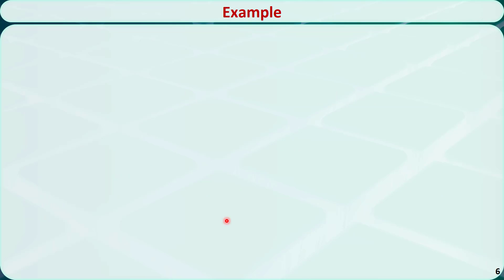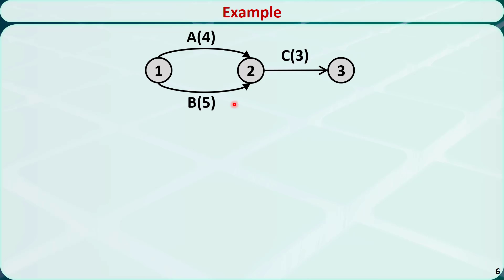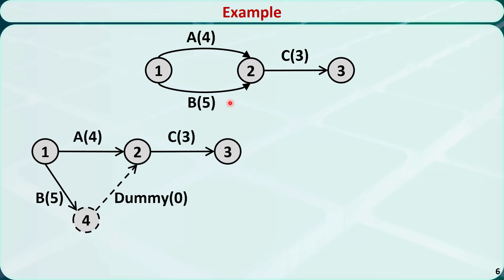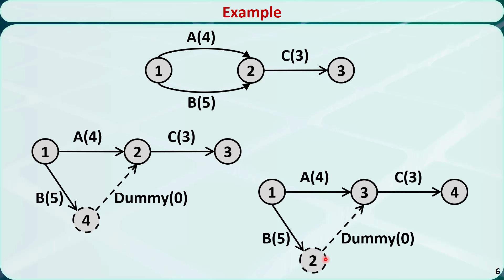Let's check this example. It has three nodes and three activities. It violates Rule 5 because these two nodes are connected by two arcs, A and B. To fix this, we add a dummy node and a dummy activity with a duration of zero. After this modification, node 1 and node 2 are no longer connected by two arcs. However, this change violated Rule 3 — for the dummy activity, the beginning node 4 is larger than the completion node 2. So we further modify the figure and renumber the nodes. Now there is no violation: node 1 is the starting node and node 4 is the end node of the project.